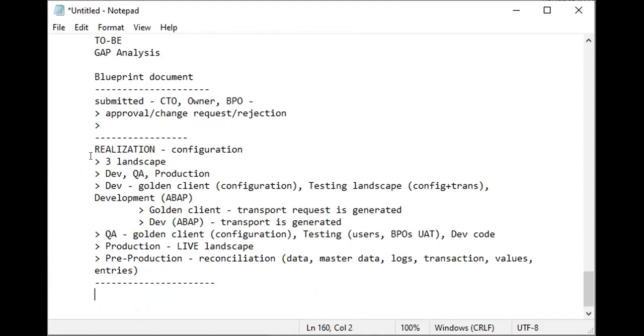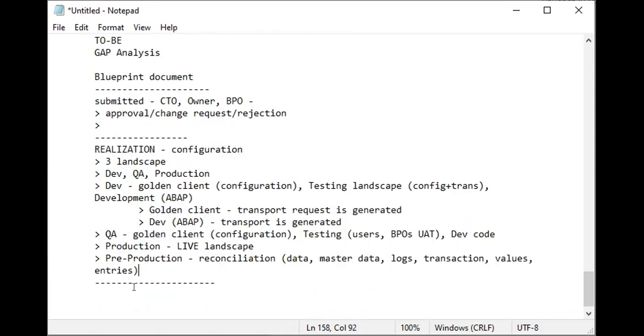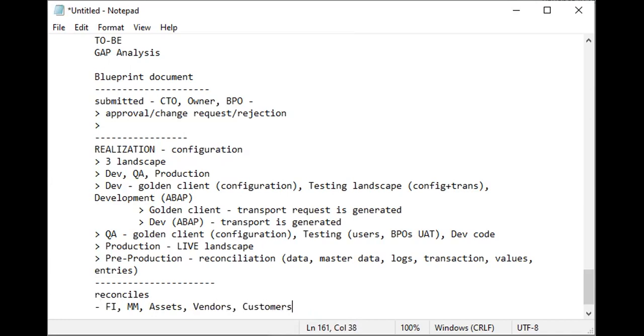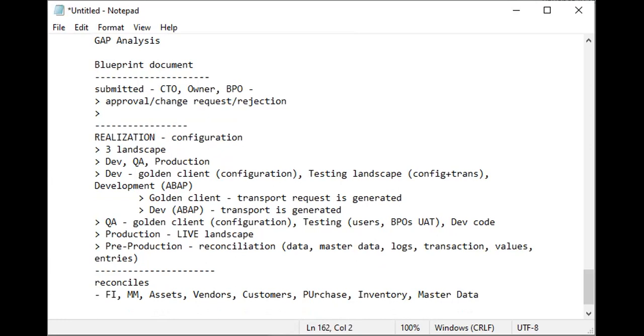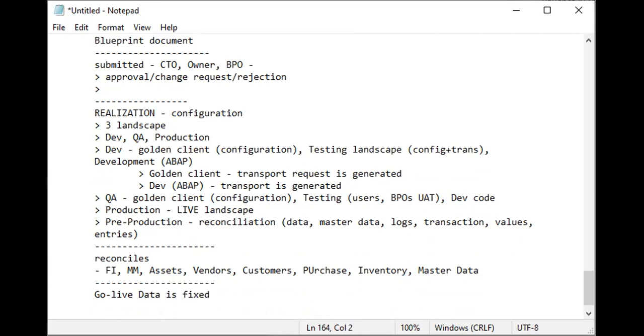This is how SAP landscape is laid out. After the client reconciles the data—and the data is for FI, MM, assets, vendors, customers, purchase records, purchasing, inventory, master data—everything is reconciled. It's a long process. It takes like ten days or fifteen days. After that, the go-live date is fixed, and before the go-live date is fixed, pre-production data transfer is made ready to be transferred to PRD.